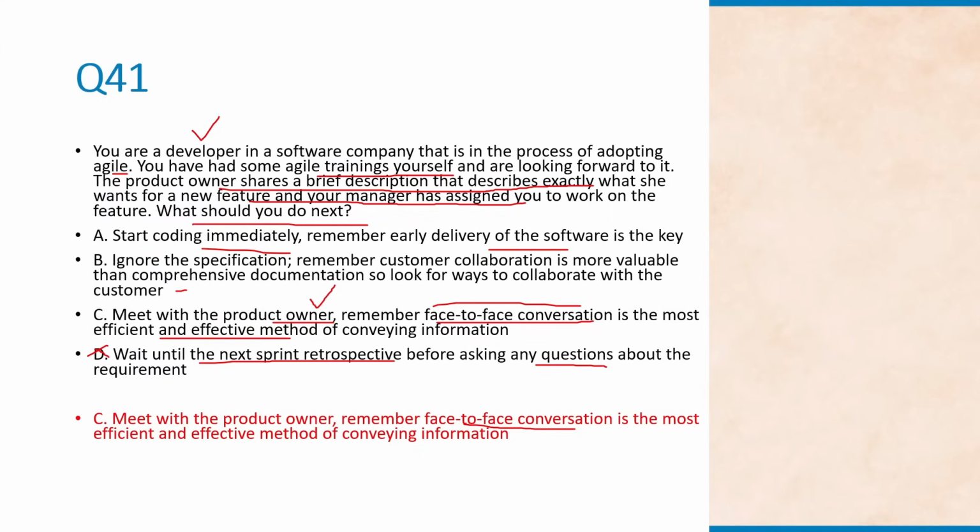Very important point. In one of our previous questions, we talked about the structure of user stories. They are structured in that way so that they start conversations, right? So these are supposed to be conversation starters, not full fledged specifications. Collaboration will always be bigger than documentation when it comes to agile values. So, meeting the product owner confirms shared understanding, acceptance criteria, and it also avoids rework.